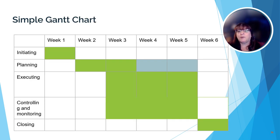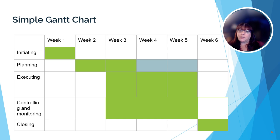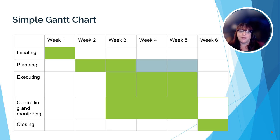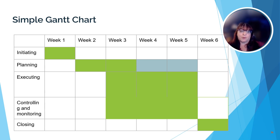We have talked a lot about how the life cycle of a project is not necessarily linear, despite how it's been presented in this course. Here's a simple Gantt chart showing a visual of the overlap of project phases. Let's say the project from start to finish will take six weeks. In week one we're getting the project initiated. In week two we begin working on the planning phase — notice that the planning phase overlaps with the execution phase because projects often begin before the plans are all in place. In week three we start the project execution phase — notice that the controlling and monitoring phase begins at the same time. The planning phase is also included as adjustments may need to be made to the scope of the project. Weeks four and five are all about executing the project. Week six contains all of the closing activities.